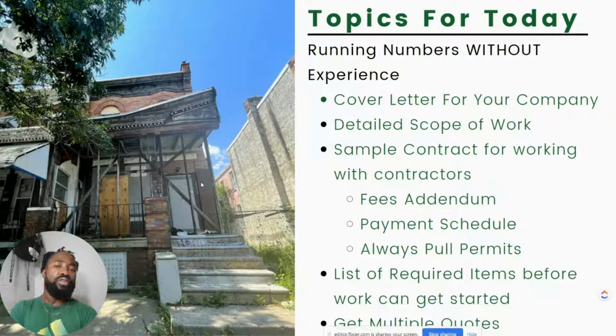So this detailed scope of work makes it so that the bids are all on the same scope, on the same line items. They're all apples to apples. You don't have apples to a pineapple. You don't have apples to a peach. You don't have apples to an apricot. They're all apples to apples. So now you can know, okay, cool. Now you can actually properly compare the bids that need to get done, you know?